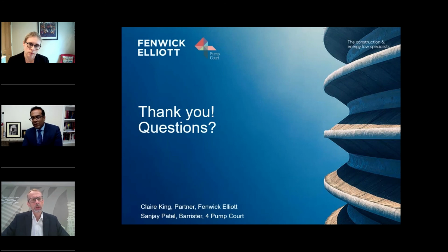Sanjay? Well, this touches on one of the slides that I spoke to earlier, which is what Mr Justice Akenhead said in Water Lily, specifically about the JCT form, but I think capable of wider application, which is that what the architect needs is what is reasonably necessary in order to assess the claim, and they can't insist upon every single sheet of paper that might be relevant. That feeds into the fact that often there is a time bar provision in the construction contract as to when this claim needs to be made, and so often the contractor is not going to be able to provide absolutely every bit of backup that they could possibly have in relation to the prolongation cost claim,